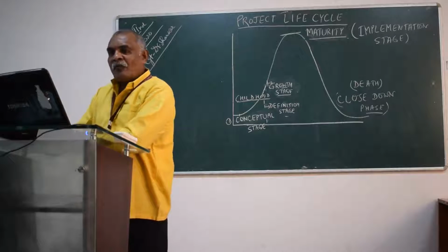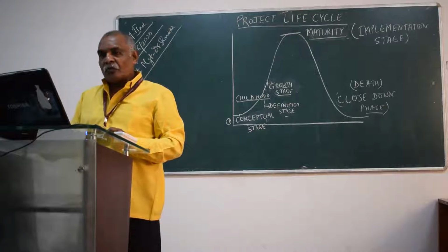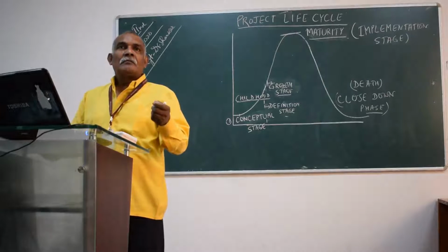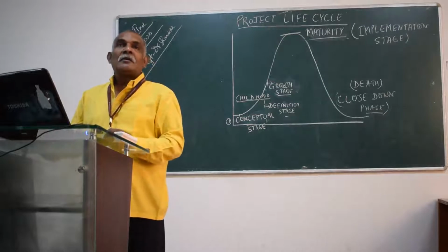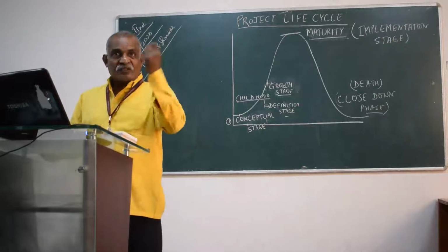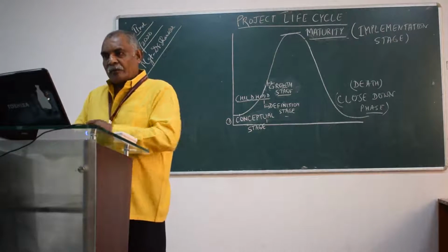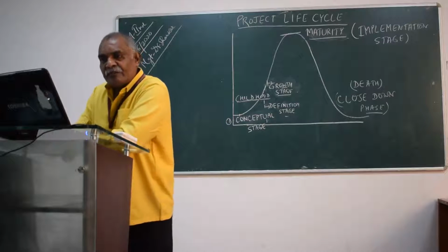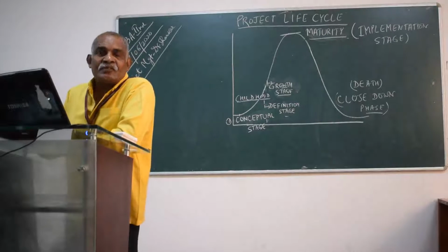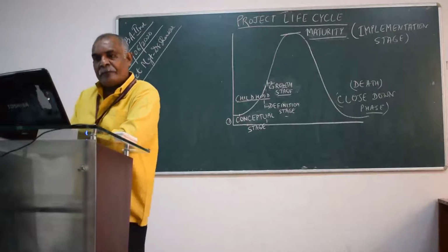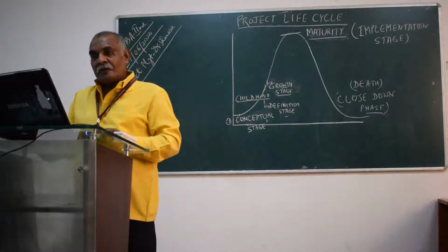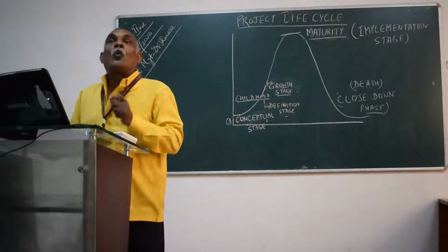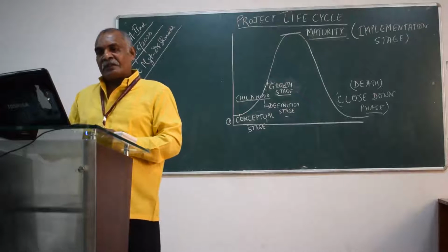As for example, when getting it done more quickly costs more. Obviously, if I want to complete the work in a quick way, we have to hire more labor. It means the cost will increase. Additionally, the quality revolution with its emphasis on customer satisfaction means that we now have to extend our definition of the project's performance to include the quality or fitness for purpose of its outcome.